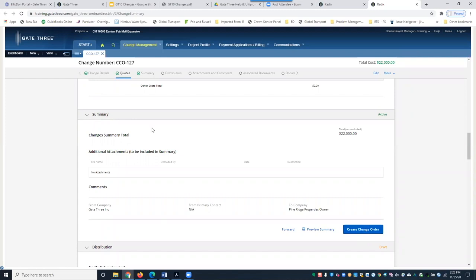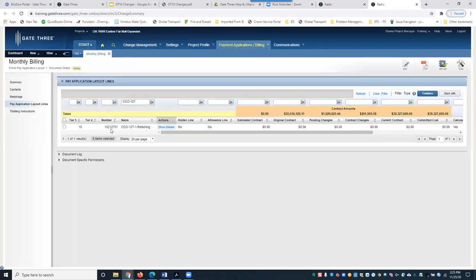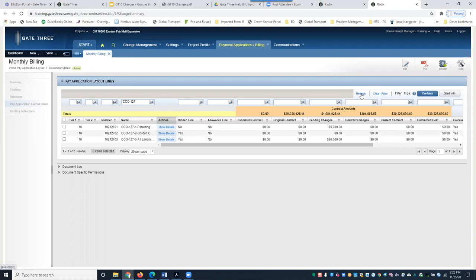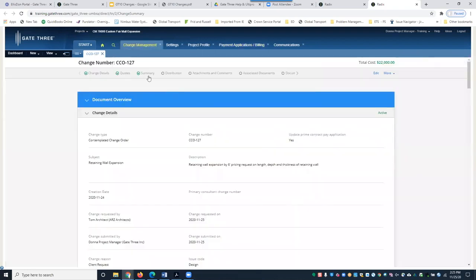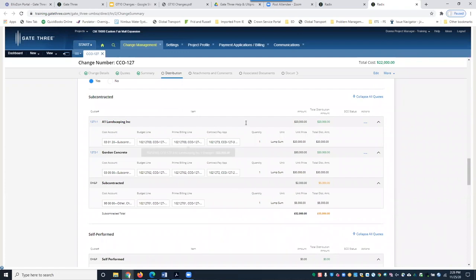Before moving to distribution, let's go back to the billing module to show what happened after submitting the summary. The pay application line that was previously created now shows amounts. The $5,000 overhead and profit is on the main change line — anything other than a contractual quote resides on the main change line. The A1 Landscaping and Gordon Concrete subcontracted quotes appear on sub-lines 02 and 03 respectively.